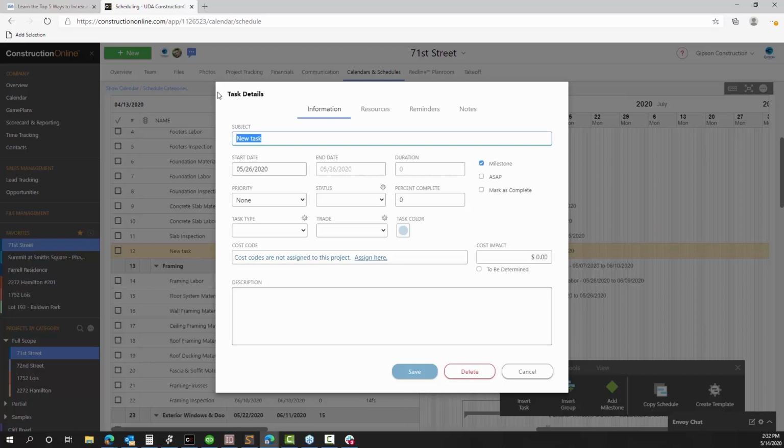it would be really helpful, or almost required in some cases, to have the selections for the projects submitted. There's such a thing as order and delivery timeframes that might have to be met, and making sure that your clients are getting the selection choices in as soon as possible really can have a disproportionate impact on the duration of the project, making sure that you hit your milestones for completing the project. Also, building the client selections into the schedule itself signals to the client that this is a real, true, active part of the process of building and completing your project.